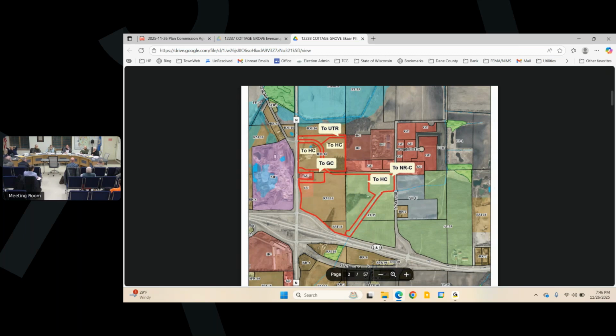So that's a new survey map, everything. Yeah, at first, what would happen if the plat goes forward is the plat gets recorded and lot 3 gets recorded in its screwy configuration. And then, and here I'm painting the ideal picture, Houston's transfer lot 3 ownership to Paul Davis. And then Paul Davis hires a surveyor to prepare a certified survey map that combines their current lot with lot 3 into one lot, so that they can build over and erase lot lines that they can't build over.